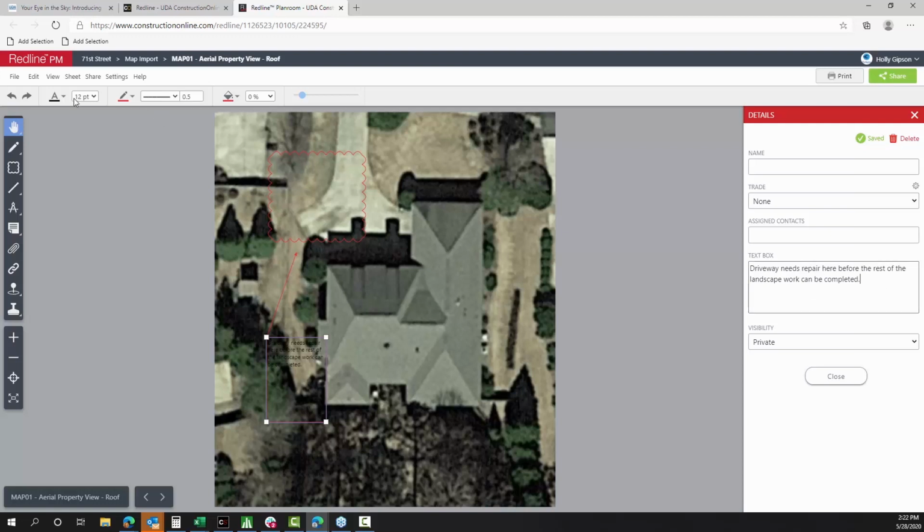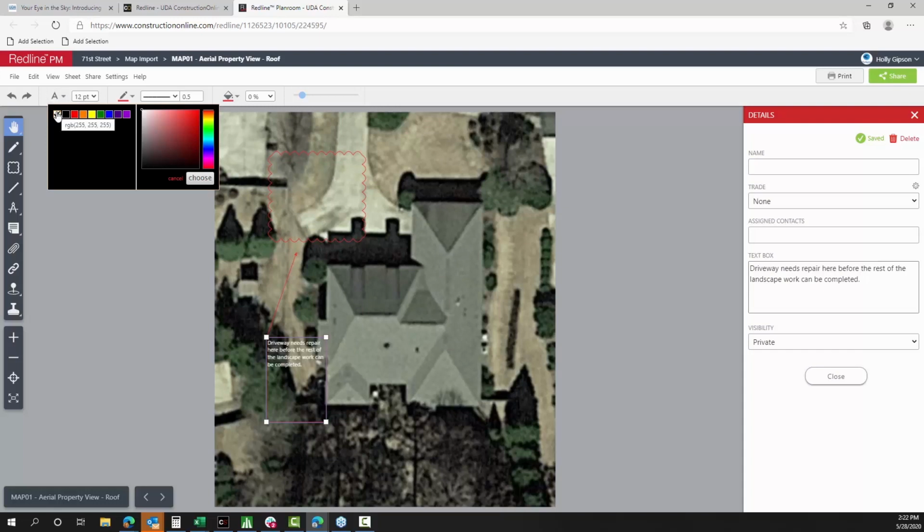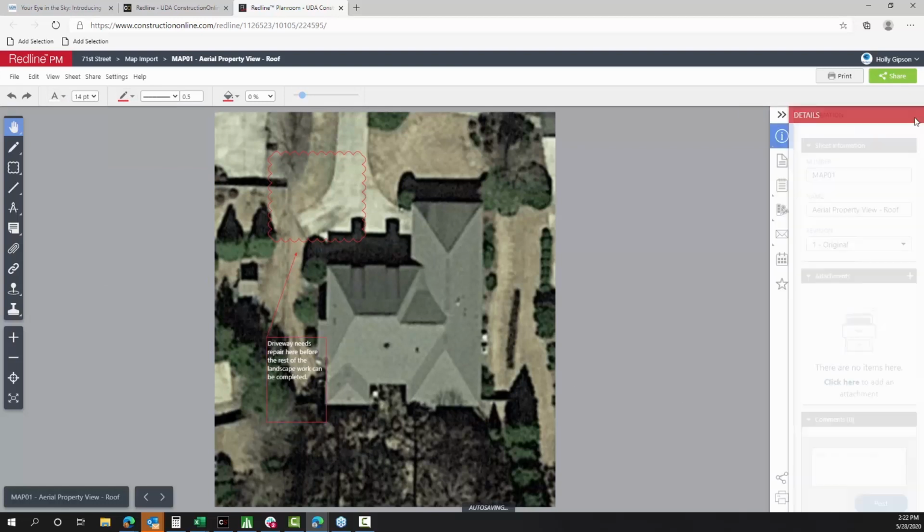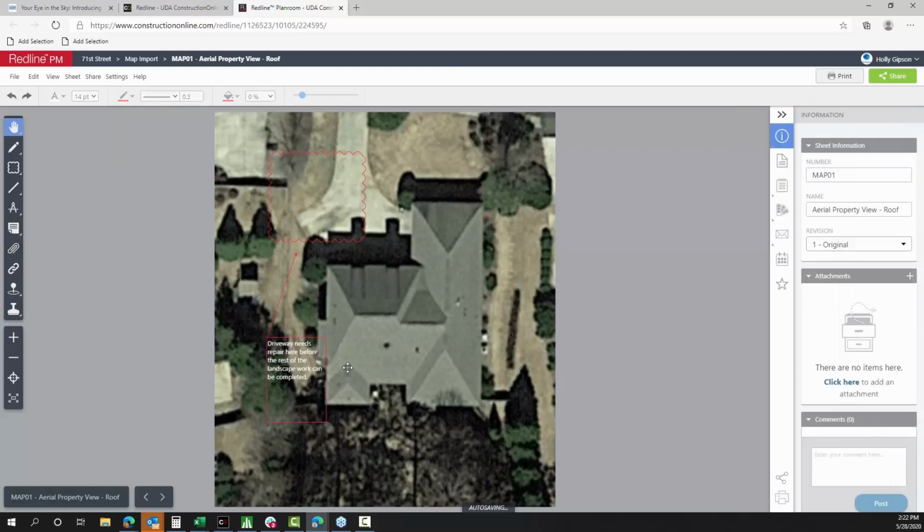And they had issues because their delivery drivers were ending up lost. They weren't really sure which part of the complex they should be driving into. So one thing that we worked on was actually pulling an overhead shot, mapping out where the delivery driver should be entering and exiting, to really speed up that process and cut down on delays as people are waiting for things to actually show up on site.